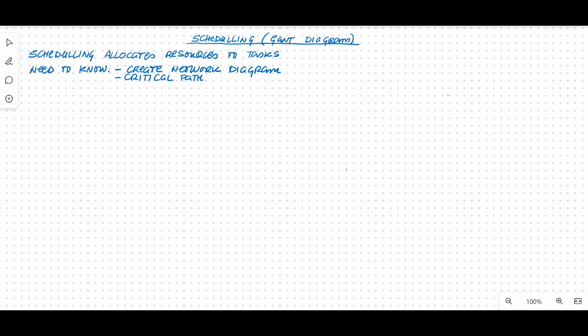The critical path is going to give you both which tasks are critical and which is the minimum completion time of the project. Now, the how-to: you're going to work with both the Gantt and the scheduling table at the same time. So you need to decide your x-axis, and you're going to make it as long as your minimum completion time, because you need to schedule everything in that timeline. So if you think of it, that x-axis is going to be like a progress bar.